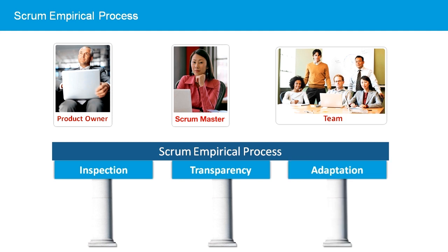It's not enough just to make observations. In Scrum, the observations must lead to adaptations. The insights gained from the Sprint Retrospective prompt the team to change how they do work, to foster continuous process improvement. Change is incremental. A few changes are chosen to implement in each next sprint.